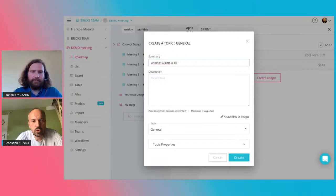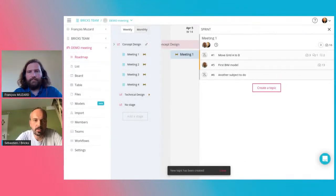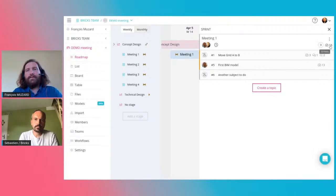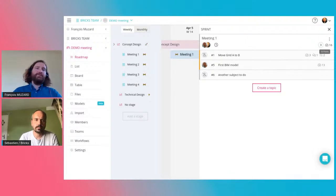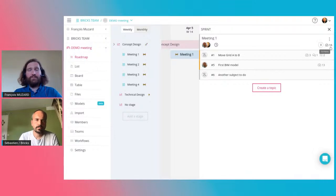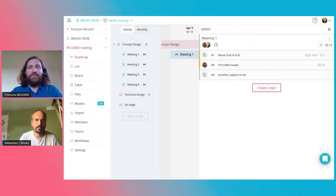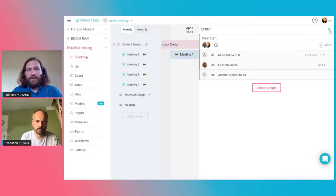Here you can see it's 16 points total for the meeting. At the beginning that means nothing to the team, but when you make a lot of sprints with the same team, you know that 16 points is okay, and when it's more than 20 you will have a problem finishing the sprint. At the end of the meeting, everyone agrees to do all these tasks. If the team doesn't finish a task, there is a problem — the team has to organize itself to finish what they have committed to.